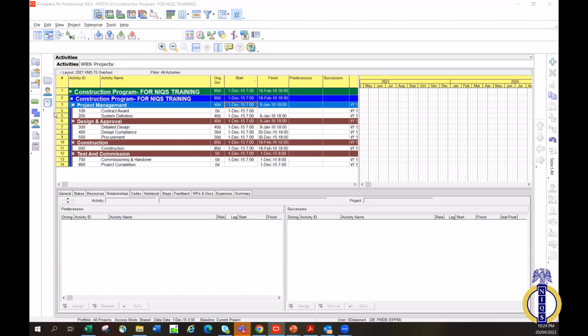You have SMEs where you are, for other things you don't know about, that you need to harness together. So usually in big establishments and for big projects, before you develop a schedule, you have what we call a schedule development kickoff meeting. You bring in all the discipline leads, and they come together and you all develop the schedule in that workshop.